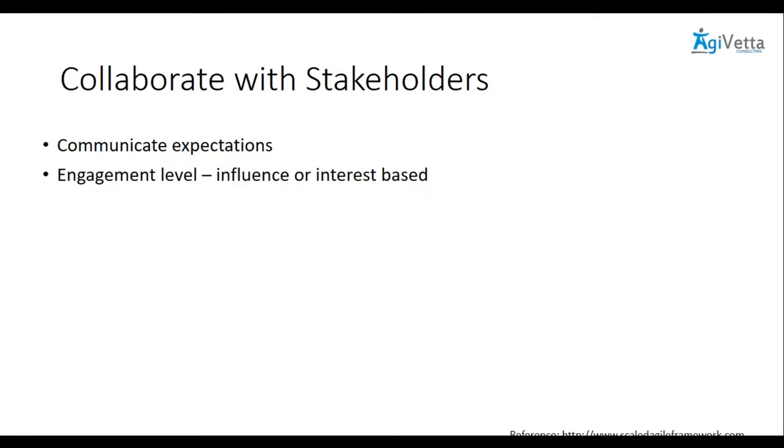People or stakeholders who exercise less influence on the team and are less available also. Such people probably only need to be informed of how things are going. We just need to monitor how things are going. The director of quality, or the manager of quality, manager of IT, and so forth. Somebody who is unrelated, a manager of some other team, who could be a potential customer later on, not very interested, not even available.